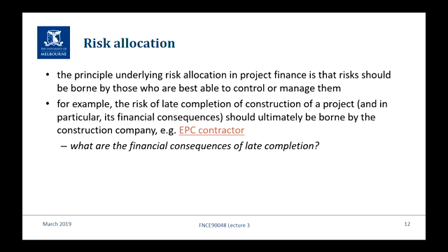You've engaged the operations and management contractor to start 1 January. Now, they've got a contract that is enforceable. Just because we can't come into the facility doesn't mean we haven't got a contract. You've got to pay us. So you're probably having to start paying contractors even before you can use them in operations. You might have problems with your offtake contracts or something like that. So there's clearly financial consequences.